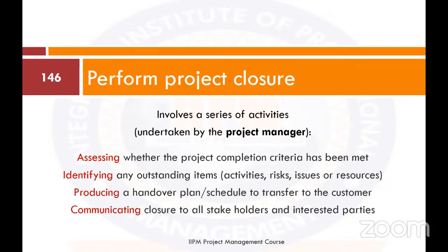Now, the activities under project closure involve a series of activities undertaken by the project manager: assessing whether the project completion criteria has been met, identifying any outstanding items like activities with issues or resources, producing a handover plan schedule to transfer to the customer, and communicating closure to all stakeholders and interested parties.